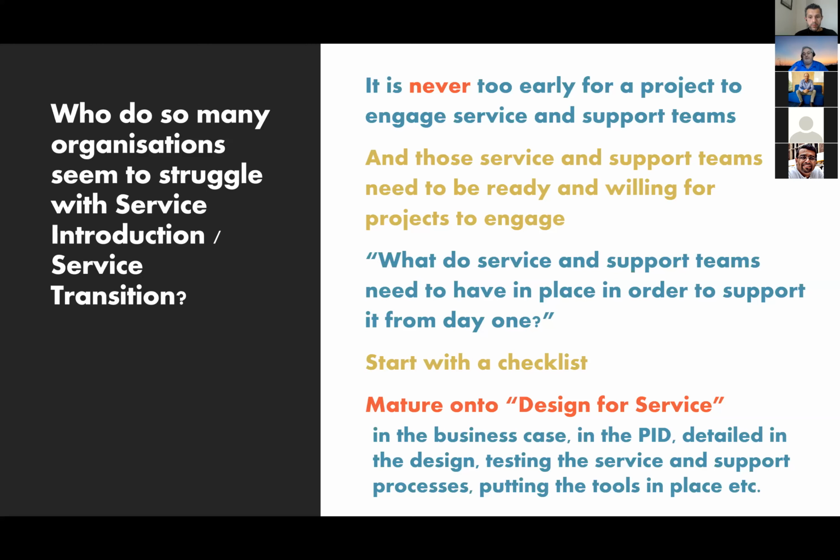My view is that the maturity step is then on to designing for service. It's about making sure that the project recognizes that, and the service teams recognize that we need to think about making sure that the project is setting up to run service all the way through. In the business case, through the project initiation document, the deliverables that are required, the work that's required, the testing that's required, the designing, the making sure that everything works before the first person buys something or uses something on that service, making sure the tools are in place, making sure the business continuity is done, making sure that everything is needed to run and operate that service so it can be fed and watered on an ongoing basis, rather than just we've delivered the project and the service will sort itself out later.